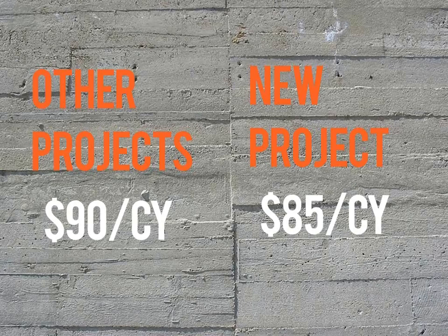It's cheaper. Well, you already need to buy the 10,000 cubic yards of concrete. That's a no-brainer. But in addition, from your project intelligence tool, you're able to pull up a report that shows that there's 75,000 cubic yards of concrete that will soon be needed for other projects in the area. So with that information, you can actually buy those cubic yards of concrete in advance at the lower price, and so you're cutting costs even on projects in the near future.